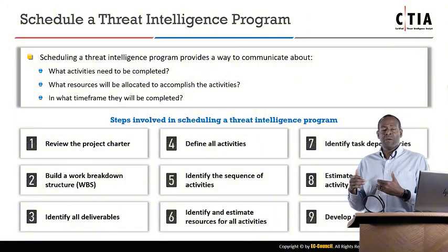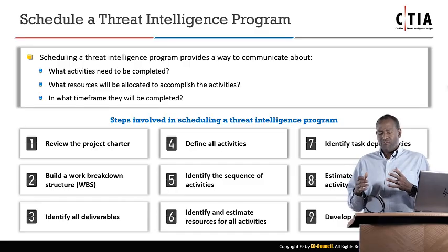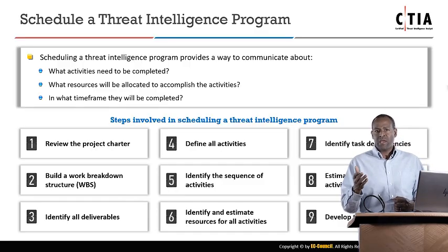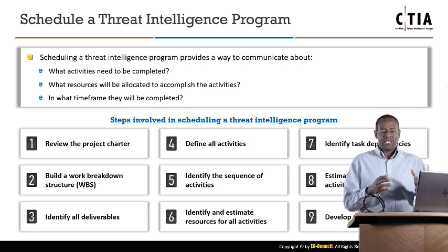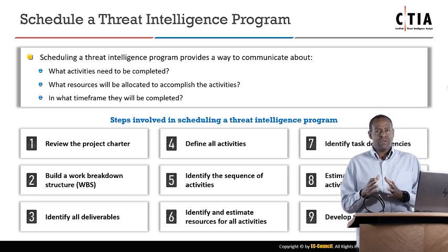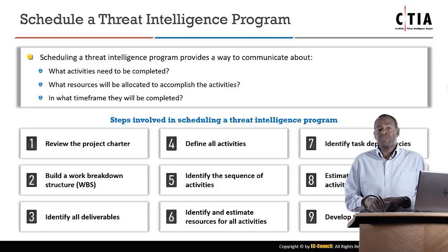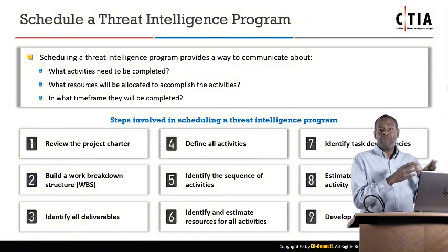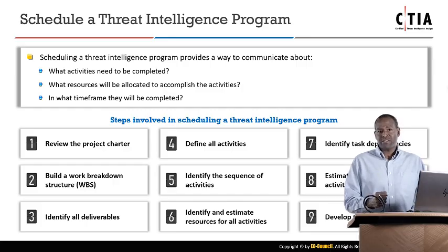However, there could be another team member that really needs to get licensing done and needs to verify parts of the plan legally or with state or local municipalities. And let's say my start date moves a month out. Well, now my developer I only have for 2 months. If the start date moves 2 months out, now I only have my developer for 1 month. So before you put the final stamp on number 9, you need to go back and review all those resources depending on that start date.